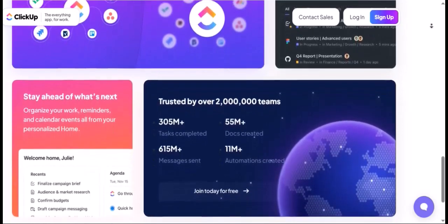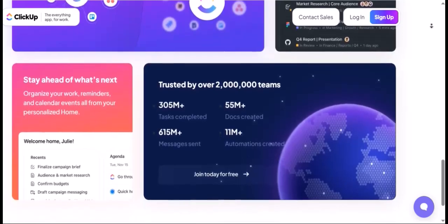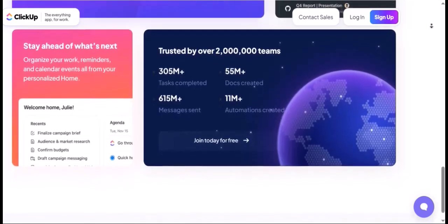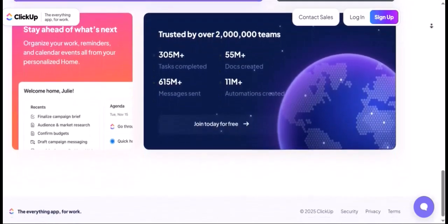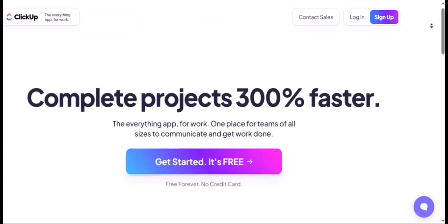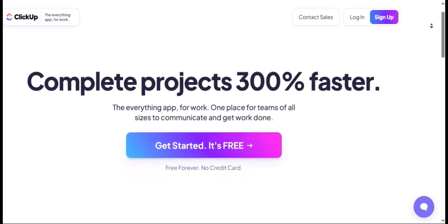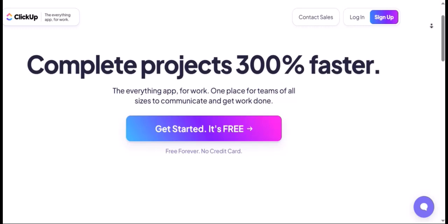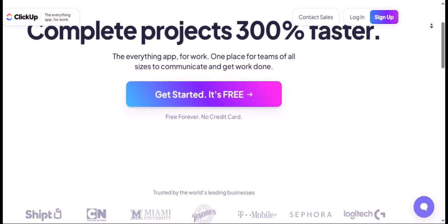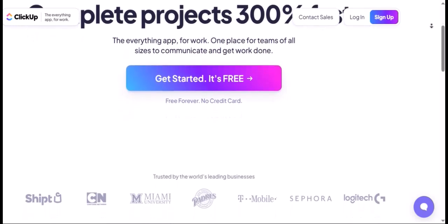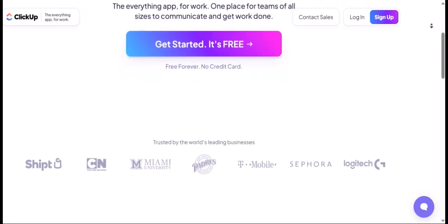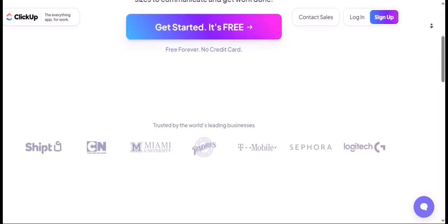4. Project costing and profitability analysis. For projects with specific financial objectives, ClickUp can help track costs against revenue. Time tracking: integrate ClickUp's native time tracking or third-party integrations to accurately log hours spent on billable projects. This directly impacts labor cost calculations. Resource allocation: visually allocate team members and resources to tasks, understanding potential labor costs associated with different project phases. Custom fields for revenue: add custom fields to track projected revenue for project tasks, allowing for simple profitability calculations within the platform.